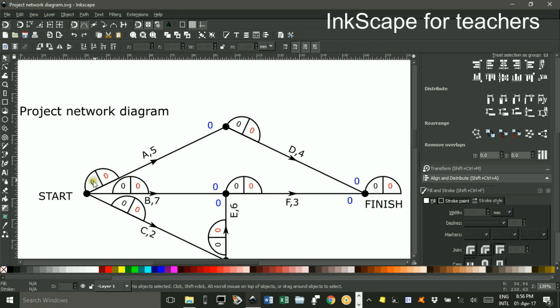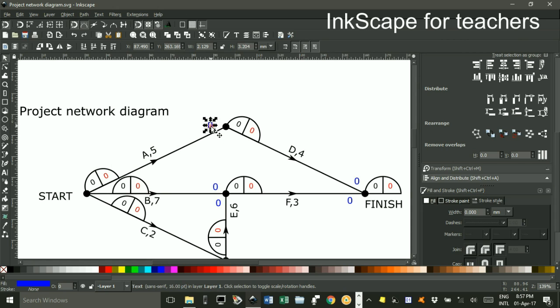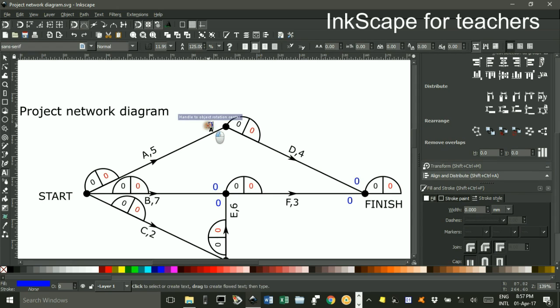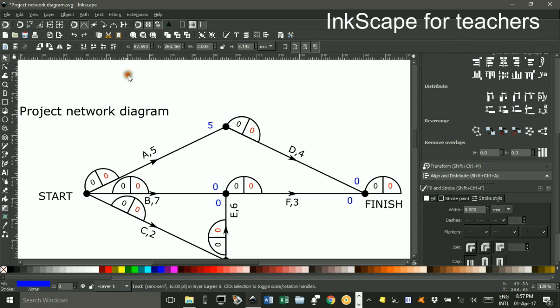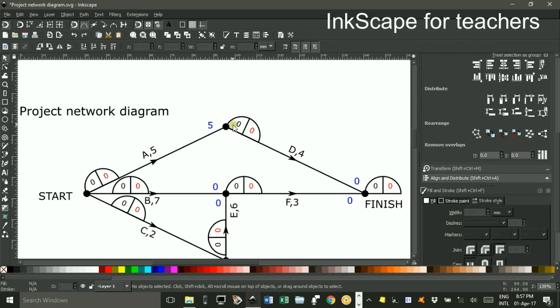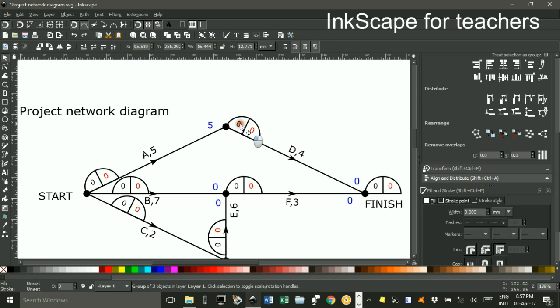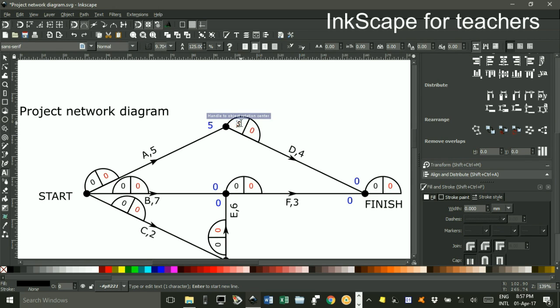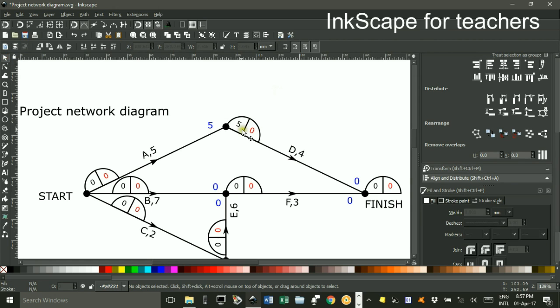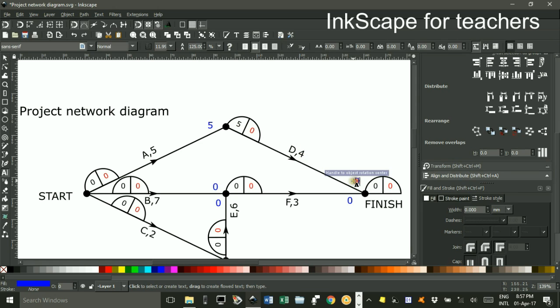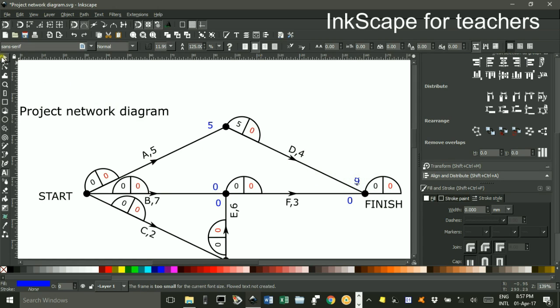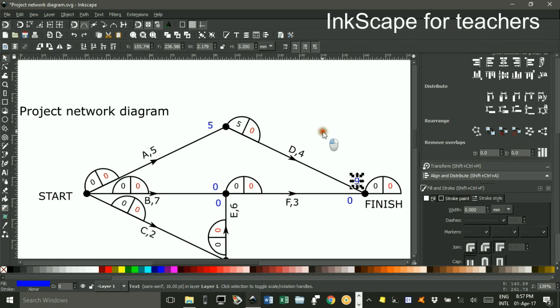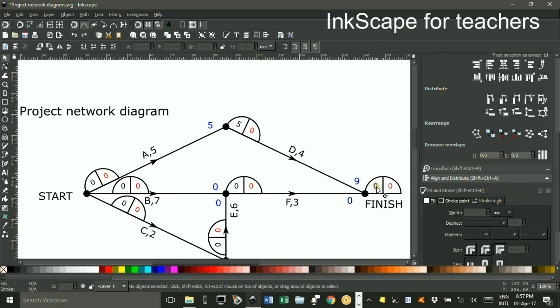Along activity A, the only way I can get to this node is spending 5, let's say, hours. So I will make that 5 hours to that point there. Now 5 is the only way I can get here, so I can make this 5. The earliest time I can start activity D is 5. Then 5 plus the time of activity D is 9, so that takes us 9 hours to get to this point. But I don't know whether I can get to the finish here because other activities might have taken longer, so I'll wait to see what that number becomes.